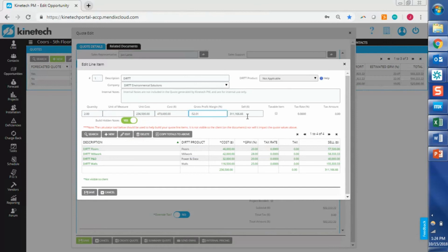It did not update our margin automatically because, I think, the situation comes up where maybe you have a small adjustment to your cost where, say, something's going to cost, I don't know, $20 more, and you want to capture that final cost here. But you don't necessarily want to pass along that change there because they've already reviewed the final quote, and it's all good. So it doesn't automatically update that, but if you update that gross margin percentage here, that will be what updates your sell price.